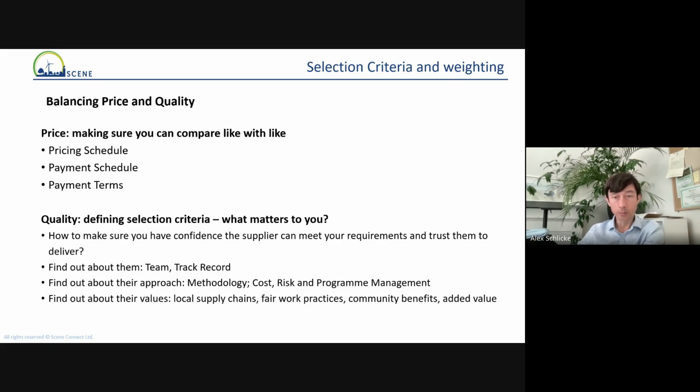The funder needs to pay your claim before you can then pay out that supplier. Now, if the supplier's payment terms mean that they've got punitive penalties on top if you don't meet their payment terms, then that can be a cost that falls to the community entity that wouldn't be covered by your funder. So these are the things to consider under price.